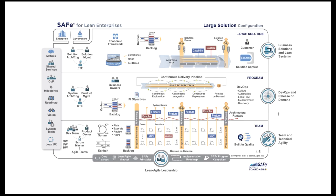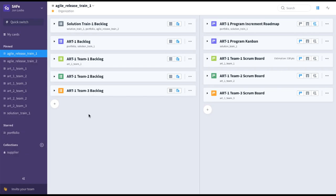Now for the second SAFe configuration — Large Solution. We've seen the team level and multiple teams of teams at the program level. What happens when you have multiple Agile Release Trains working on a very large solution, making up a solution train? This is where Large Solution SAFe comes into play. In this example, we've added a second Agile Release Train with its various teams, as well as a solution train or large solution level collection.